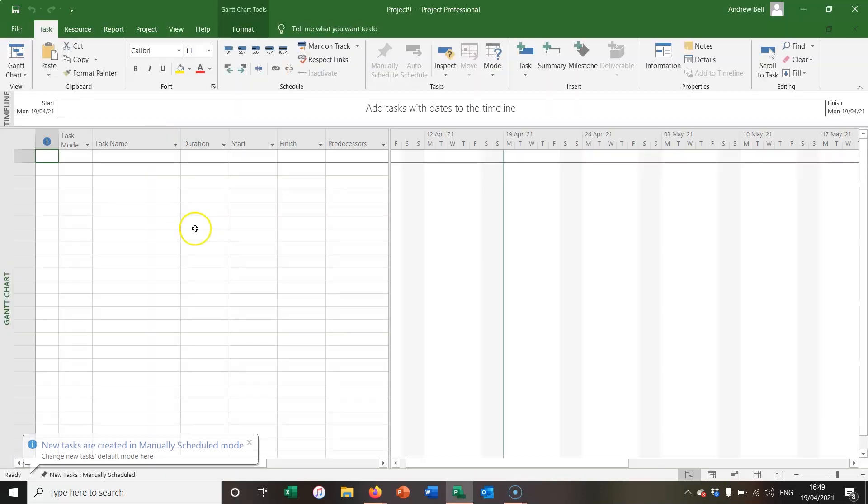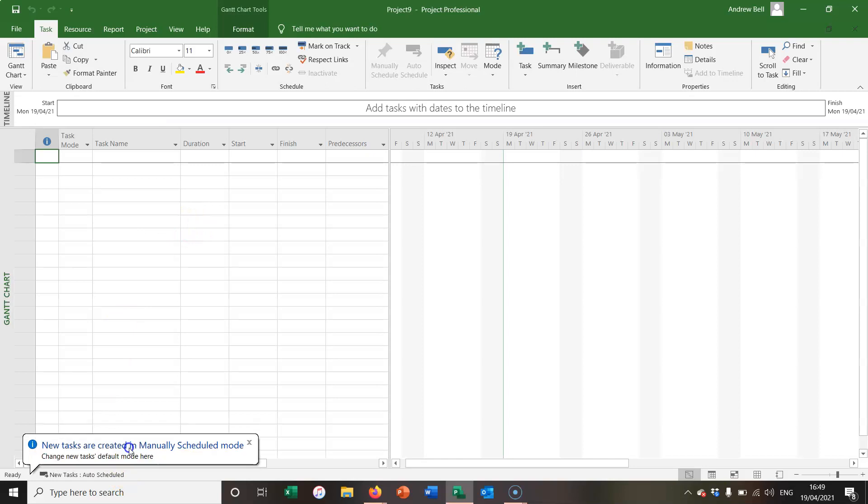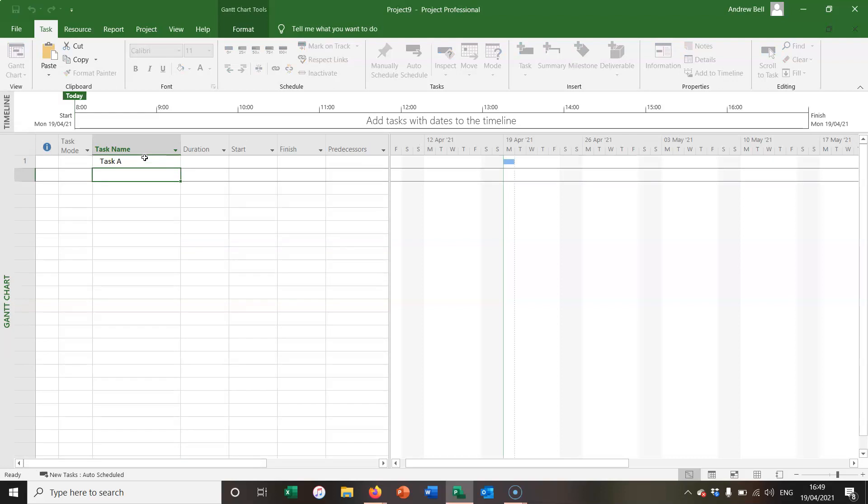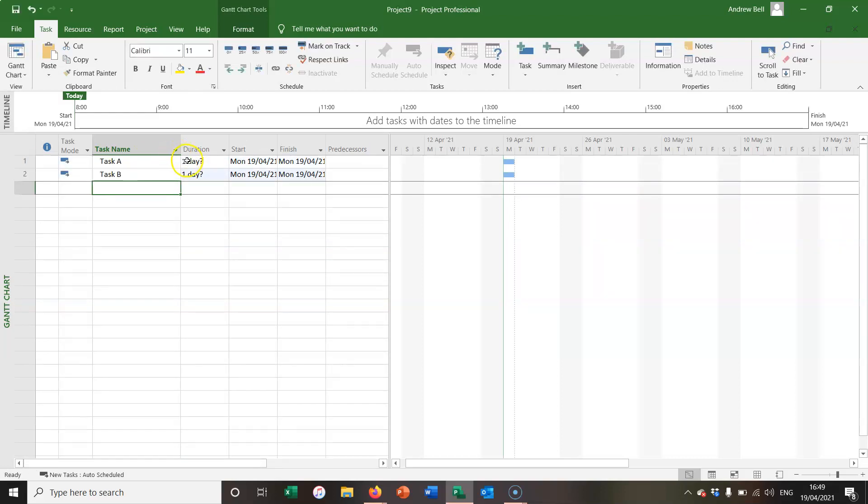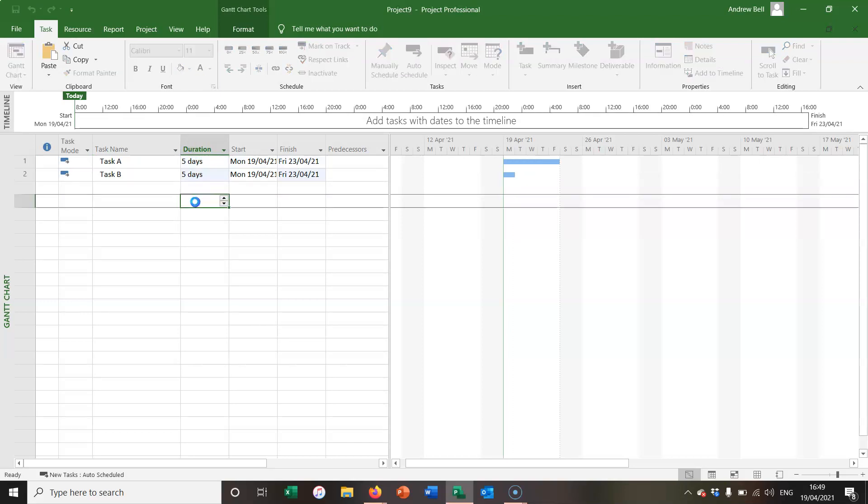I'm opening up a new blank project and I'm changing my tasks to automatically scheduled. I'm going to put in two tasks, task A and task B, and I'm going to make them five days so that you can see them better.